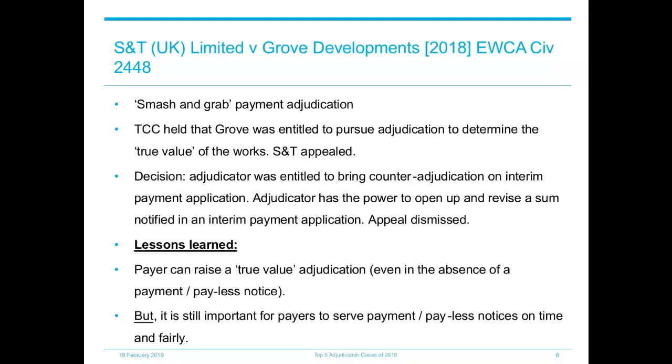However, the Court of Appeal stressed that the adjudication provisions in the 1996 Act are secondary to the payment provisions, and therefore payment must be made following a successful smash and grab claim before a dispute on the true value of the application can arise and therefore be adjudicated on.